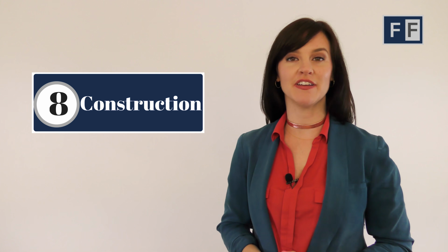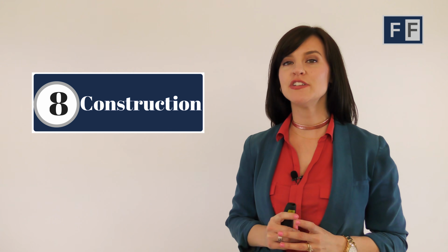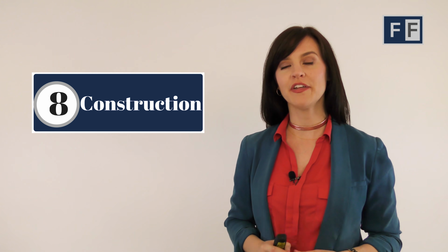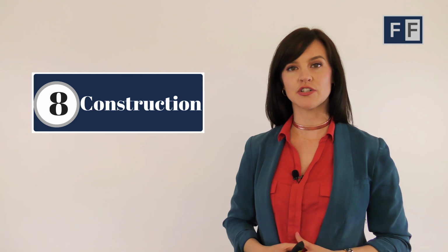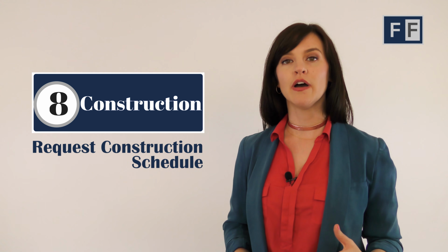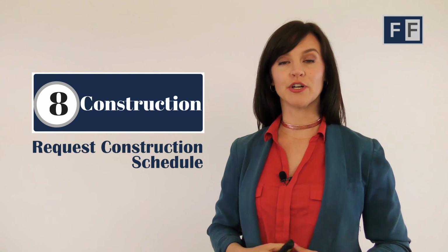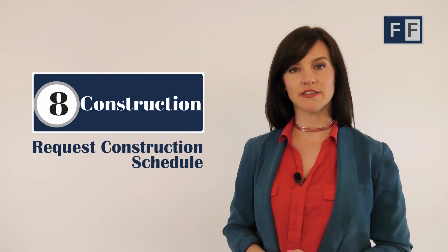Okay, after permitting comes step number 8, which is construction. Now, as you can imagine, construction has a lot of moving parts, and it's your GC's responsibility to manage all of those moving parts. Now, one thing that I would recommend for you to do is before you get too far into the construction, you want to make sure that you get a construction schedule from the GC. That will help you manage that timeline so that you are meeting your commitments per your lease agreement, and you're also meeting those commitments that you made to the franchisor.